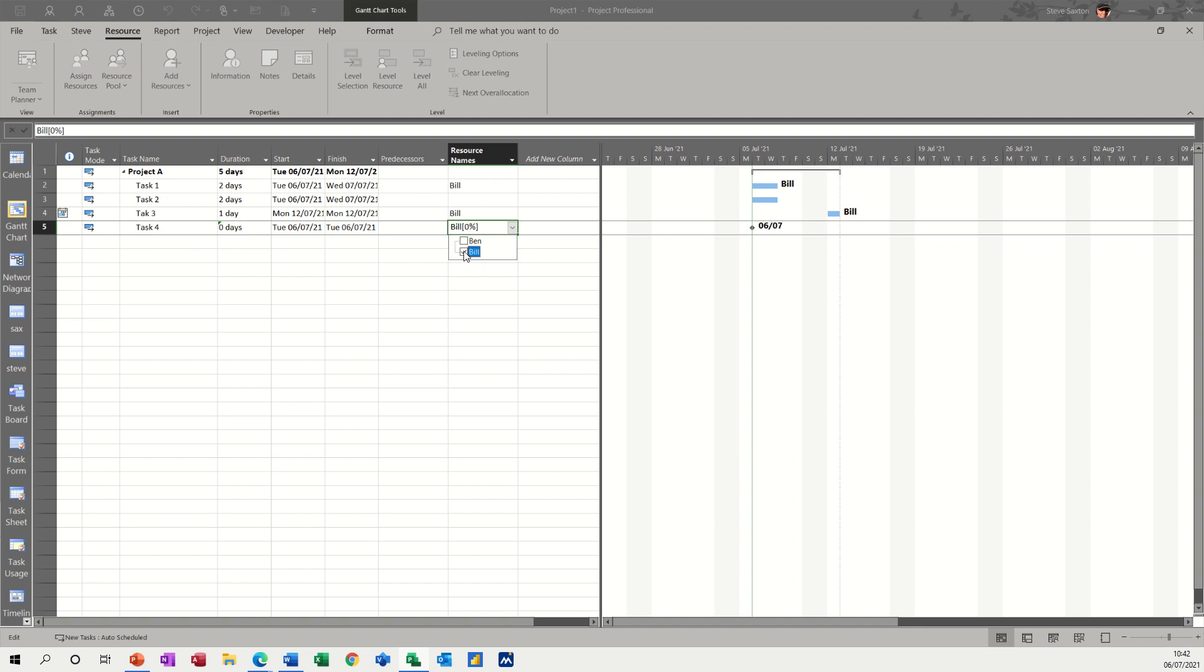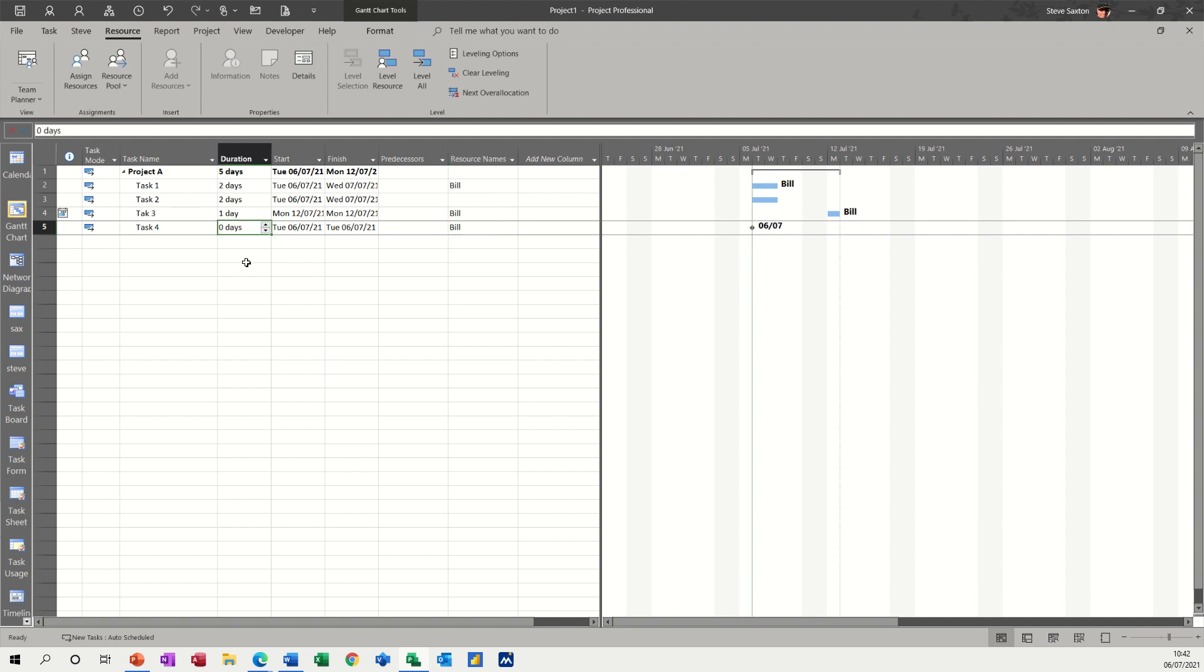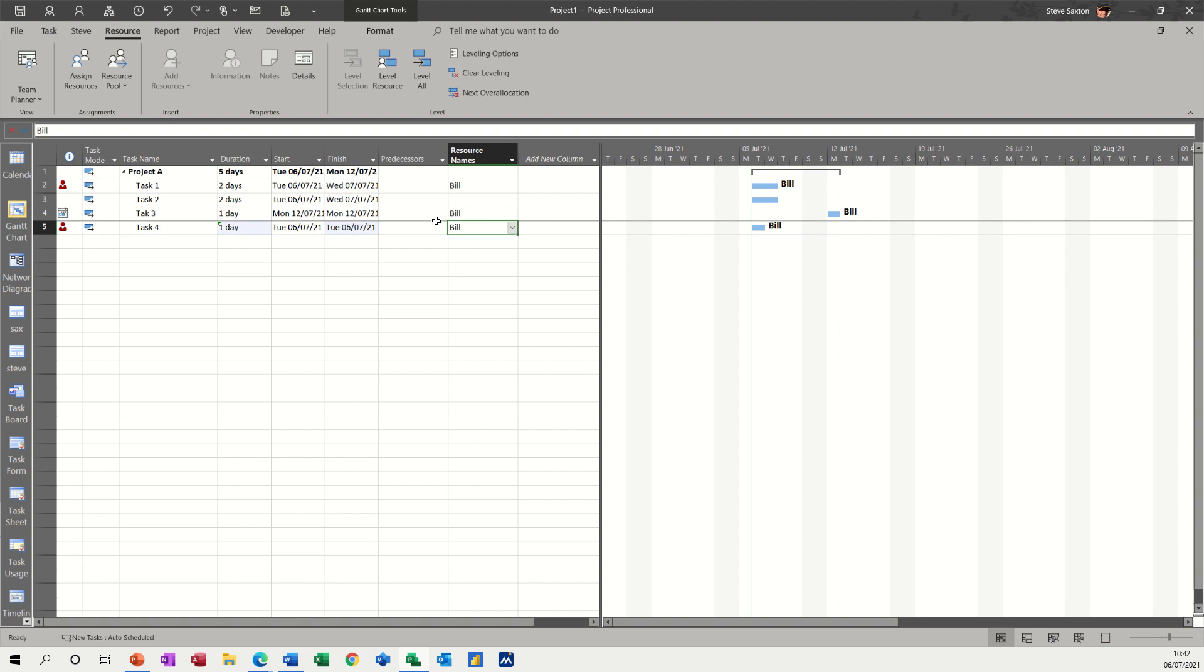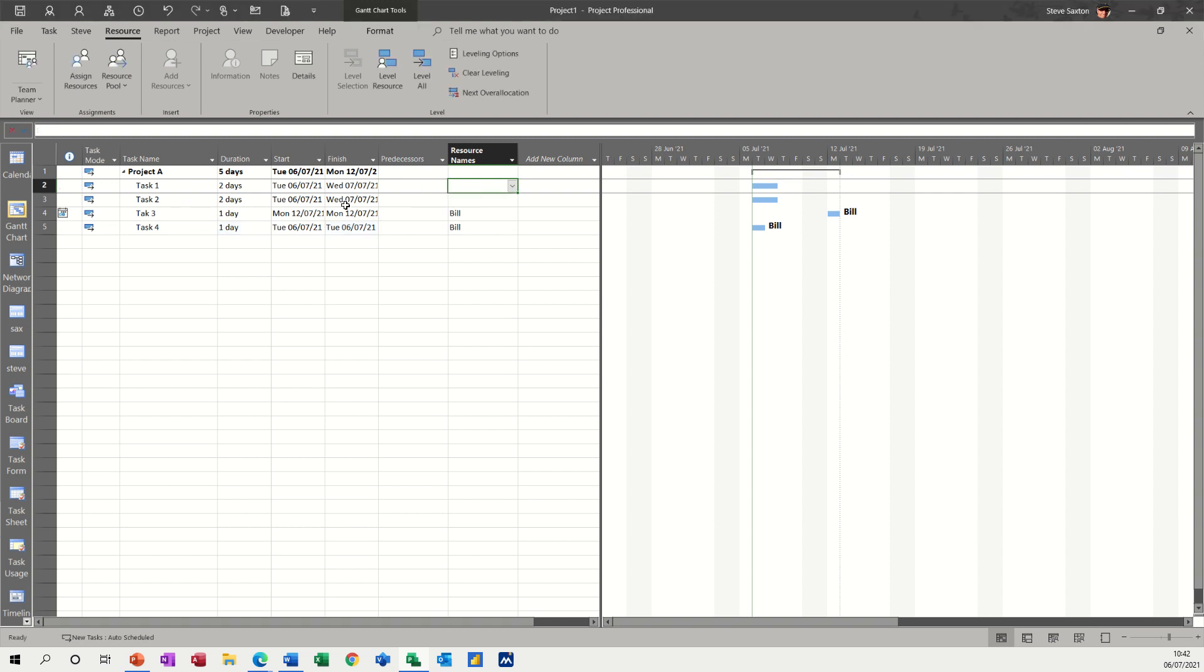The duration needs to go back to one day because it was put to zero. And Bill, if I take him off and then put him back on, that should fix that. Yeah. One day. Bill. He's over allocated now because he's clashing with his top one. But if I take that top one off, that should fix that. It does fix that.